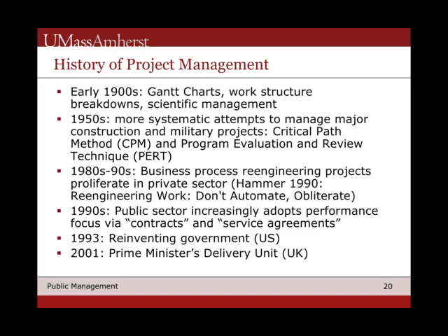By the 1950s, a lot of the military in particular were really trying to use some of these principles to do a better job of scientifically improving performance on all sorts of military issues, but also in terms of major construction. So there started to be things like the critical path method. Basically, the idea was that you didn't want to get, as you were going along and you're building a building, and then all of a sudden you realize, oh, the part that we need, before we can go to the next step. So we can't basically cover the walls, put in the floors, do anything until our electricity's been installed. But whoops, we forgot to hire an electrician, or the one that we got just got sick and they don't have all their parts here.